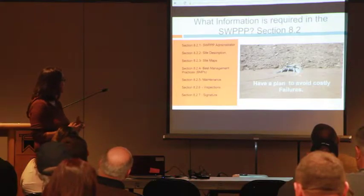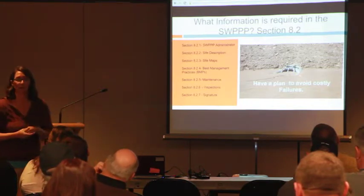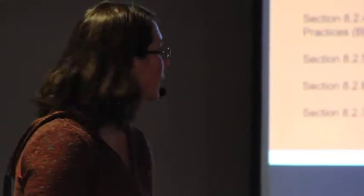If it changes, you need to change your SWIP. And you'll hear that a lot throughout the presentation. Something on-site changes, you need to change it in the SWIP. Your SWIP is no longer good if something's changed and you haven't updated. So make sure you're changing that in your SWIP. If somebody left and you replace them, you need to identify it either by job description or by name. So it's up to you, but it needs to be updated.